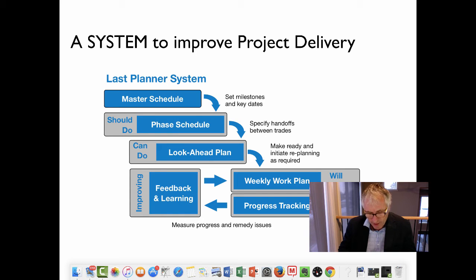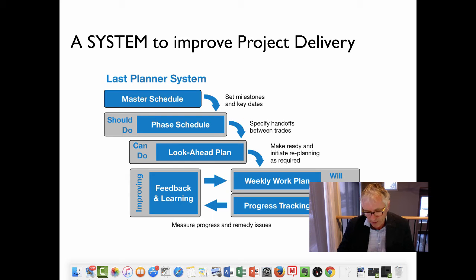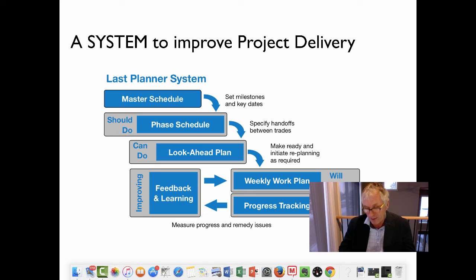The six-week look-ahead schedule is used for workflow control to meet the phase plans and ensure that there are no constraints that will affect the weekly work plan. It identifies the work that can be done by matching the workflow to capacity, maintaining a balance of work to minimize downtime and develop plans for how the work will be completed.